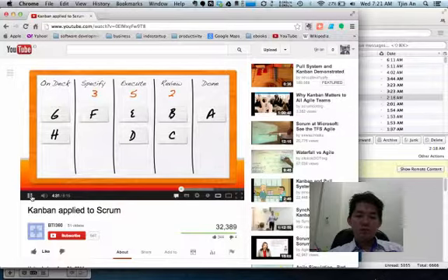Remember our previous example? Due to the WIP limit, task B and C are holding up the flow of work. Therefore, the team must focus on getting at least one of them 100% done to free up the capacity in the review column. In doing so, not only is the flow of work restored, but 2 tasks have just been completed. Identifying and eliminating bottlenecks like these early and often is one of the keys to Kanban.